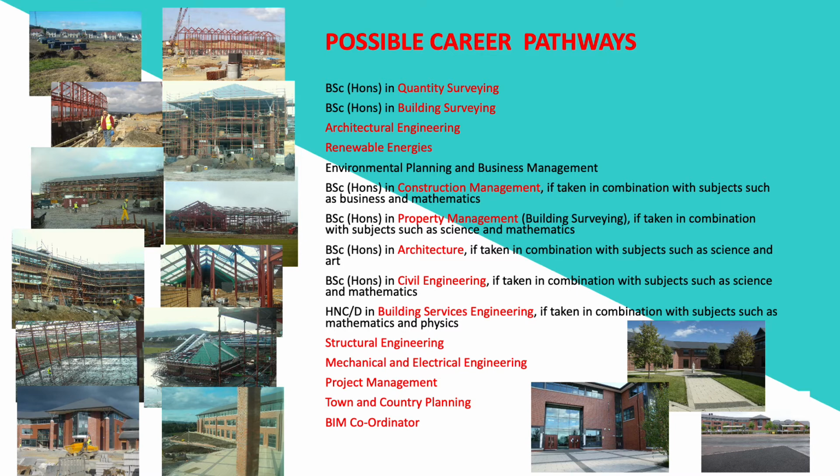What stipulations were they putting on us in terms of the size of structure and the access and egress, and whatever else was involved in that aspect of it, and our environmental impact on the surrounding areas and how we would blend in with the houses that are our neighbours close to the site. So that was planning, and they would then give us planning permission to build.